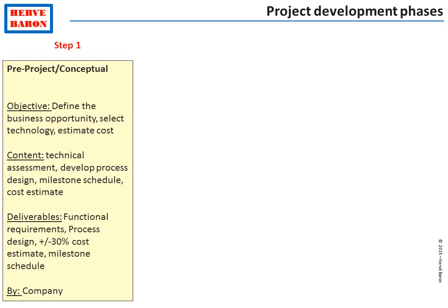This process is carried out internally within oil and gas companies, since it involves a lot of coordination, for instance, between reservoir department, as well as financing, technology, and so forth. This step is called the pre-project or the conceptual phase. The main objective is to define the functional requirements of the project, as well as to obtain a preliminary cost estimate of the investment.